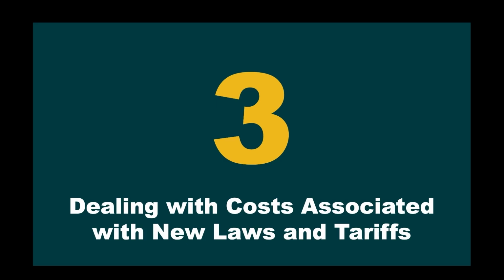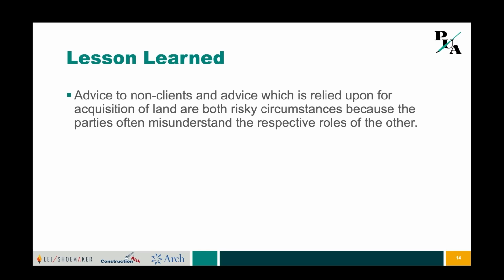Jonathan, before we go to the next topic, I just want to make a couple additional lessons learned just from observation of standard of care clauses. If you have no standard of care clause inserted in your contract whatsoever, courts will not hold you to anything more than the generally accepted standard of care. So if you're silent, you've got a decent standard of care. We get into trouble when we sign a contract with a project owner that makes us have a higher standard, highest standard, or a warranty type situation. Those are uninsurable and they create real problems.